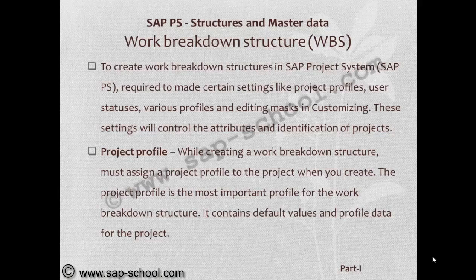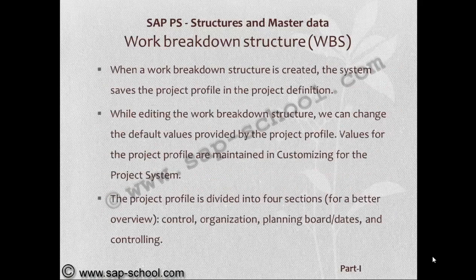While creating a work breakdown structure, we must assign a project profile to the project when we create it. The project profile is the most important profile for the work breakdown structure. It contains default values and profile data for the project. When a work breakdown structure is created, the system saves the project profile in the project definition. When editing the work breakdown structure, we can change the default values provided by the project profile.